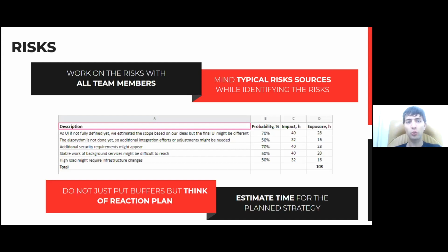In this case, we need to go over the risks for the mobile application, and the risk sources are something from third-party integration, from payment system modules, the Android application working on different Android devices, and so on and so forth.